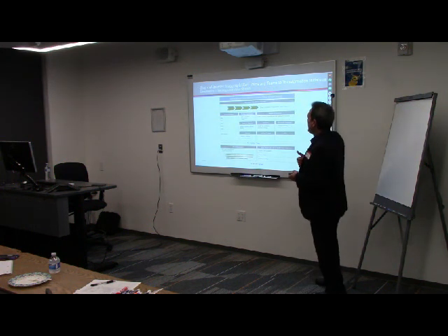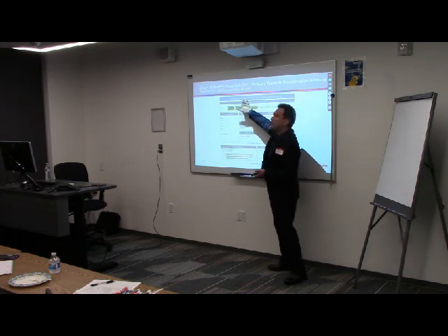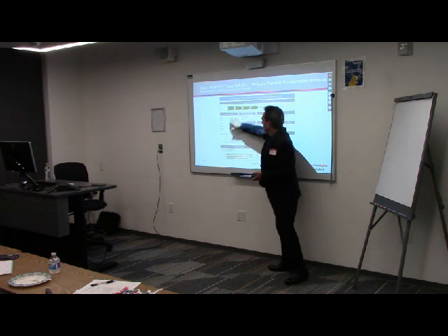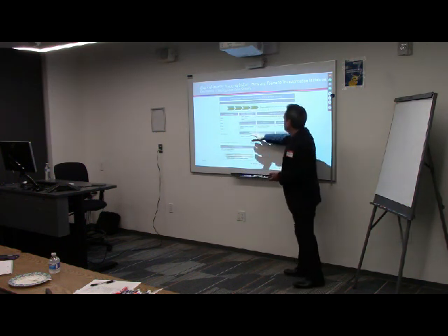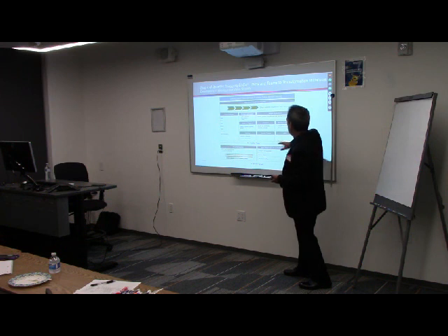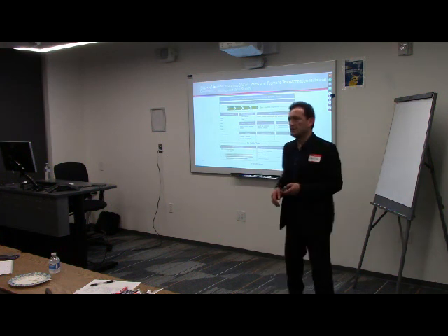For you to understand the value stream, you need to be able to document it. This is an example of how you document a development value stream. We call it the development value stream canvas. And specifically, it has a vision statement, who the stakeholders are, who the customer segment is, what solution is focused on, people and locations, channels, economic framework that you use, and key performance indicators. You want to be able to have a quick one-pager about each one of those value streams.